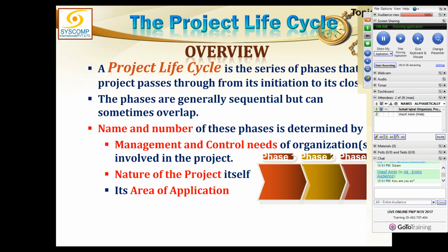Now, this way we can also ensure and confirm that all the phases we have completed, they have been accepted and paid for. If I am in the 5th phase and somebody says your phase 1 is disapproved and you have to go back to square one, that is not justified. You must clear off phase 1, 2, 3, 4 before you start phase 5.